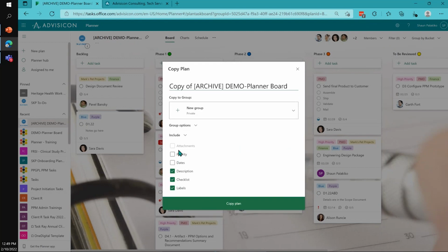All right, what can I bring along with this template? One thing that you can't bring along is attachments. So if you have default templates, forms, I don't recommend that you use that on the template. You can set the same priorities. The first contact email needs to go out, so that's a high priority. I definitely don't recommend copying the dates unless you're fixing a board. Different projects will have different dates.